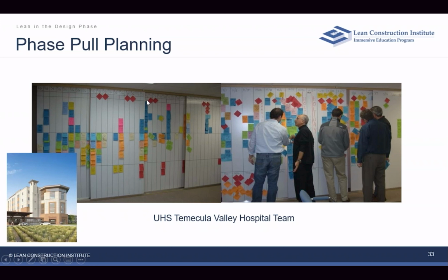and this one is actually broken down to the days. So each of these boards, each vertical column, is representing a day, and they're putting their stickies on. You'll notice that some of them are tilted. What that often means is that they're either signaling that someone's making a request or that someone is not yet quite committed to doing that.